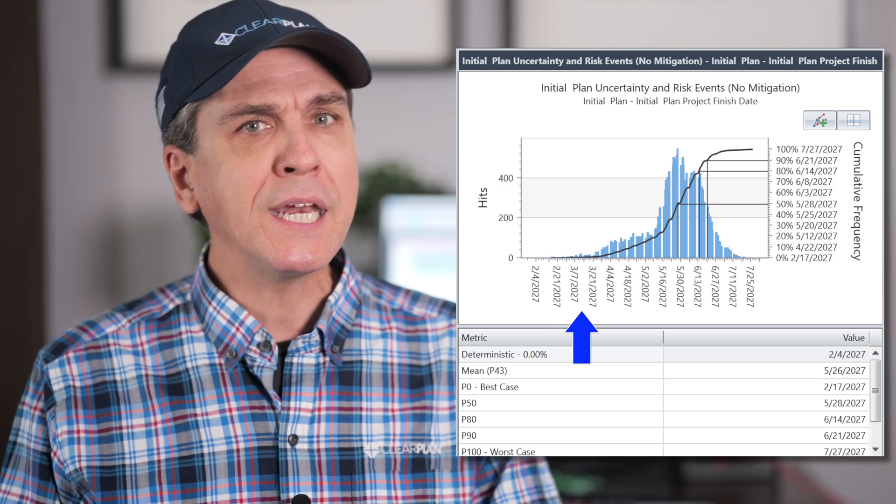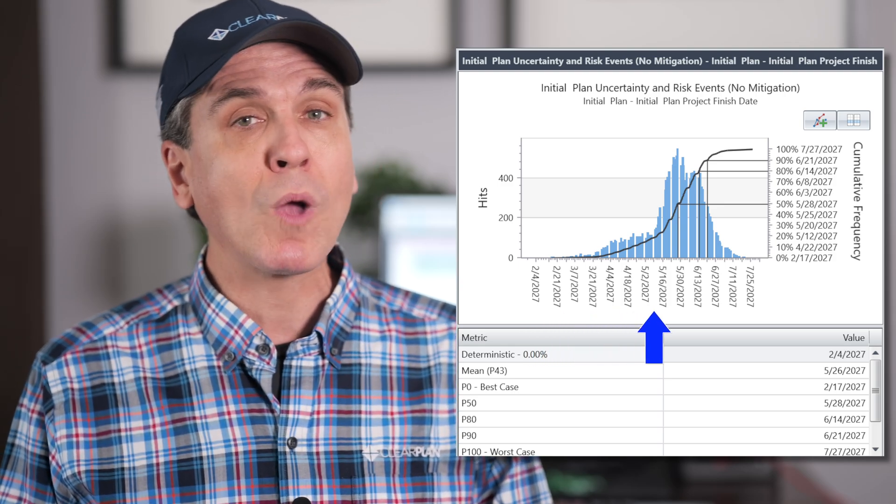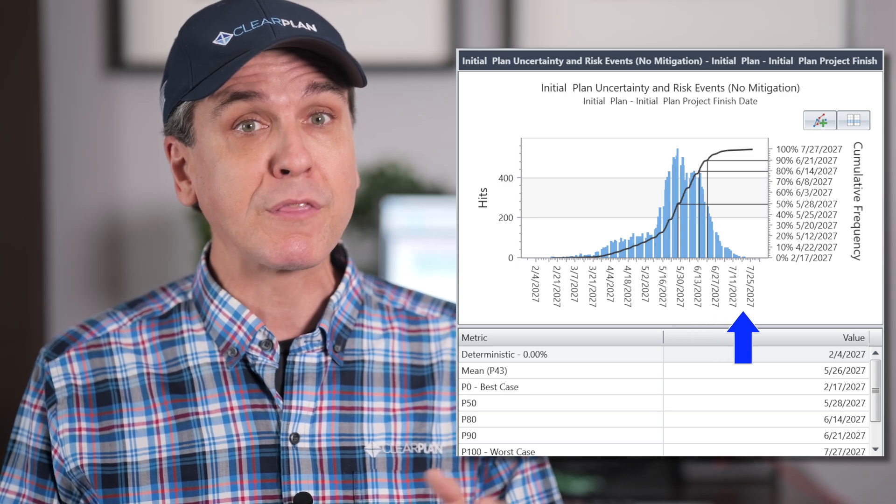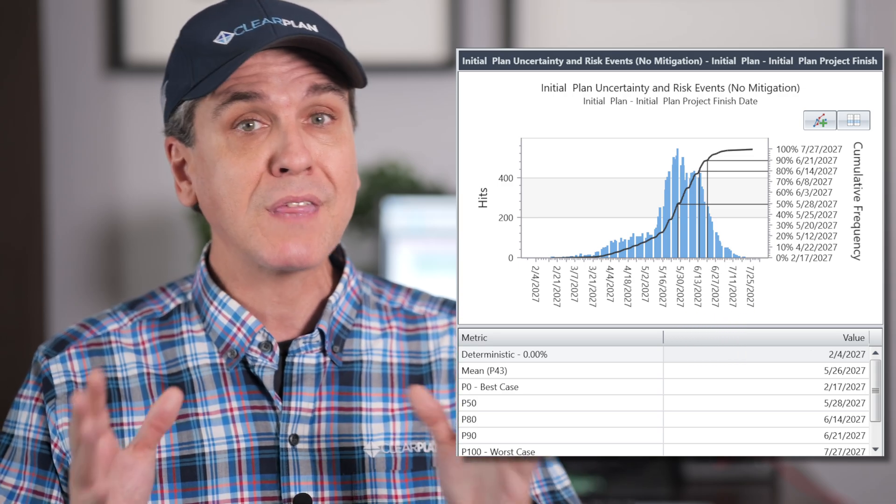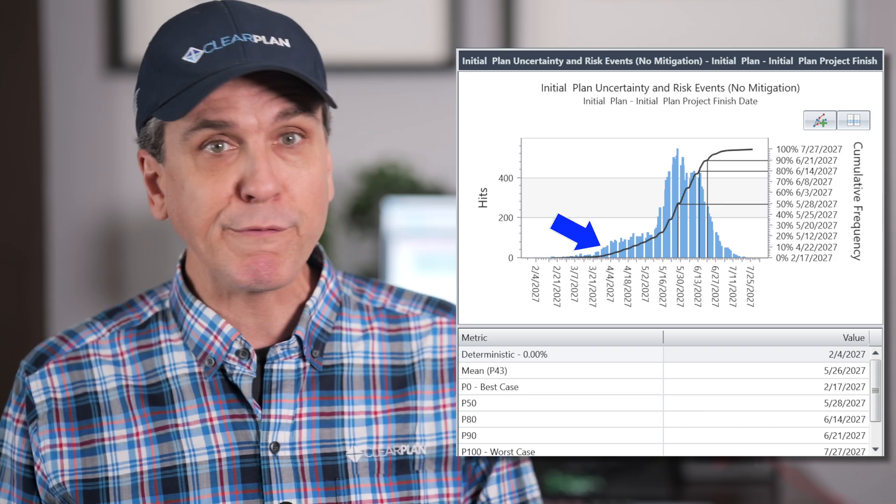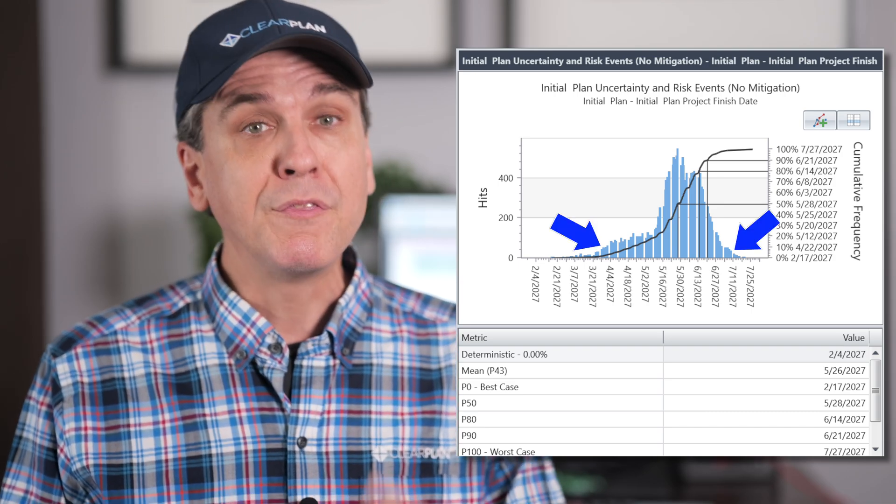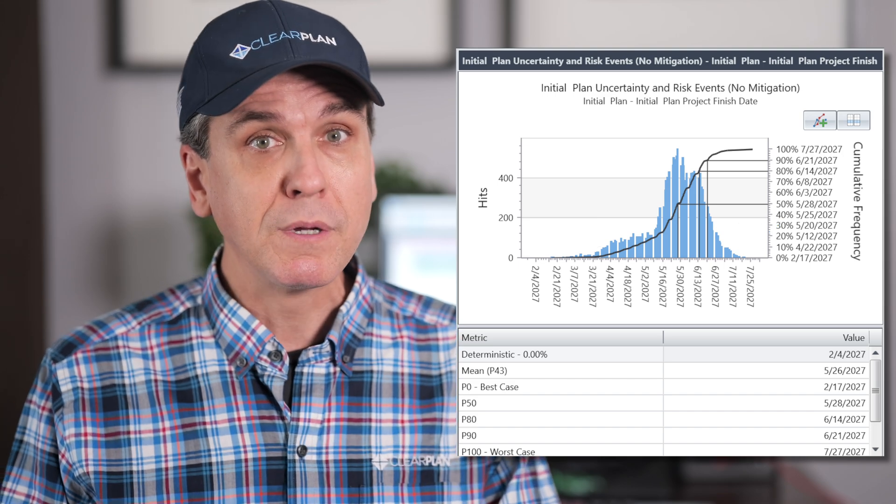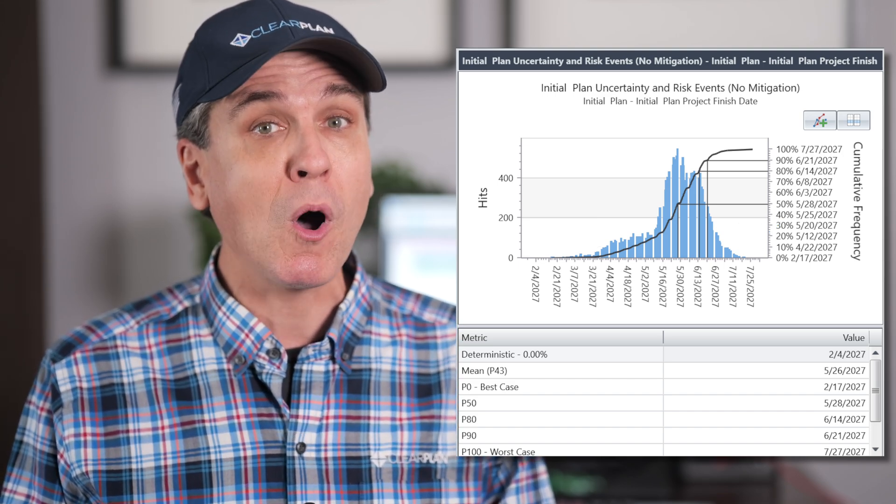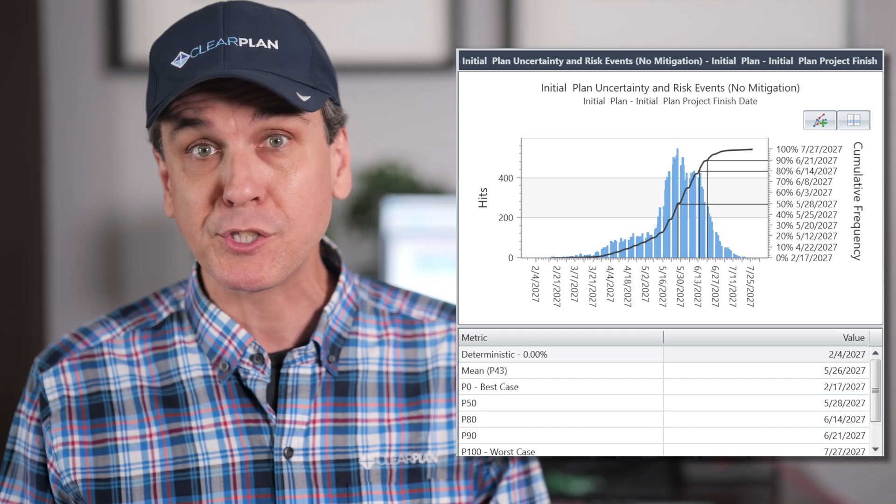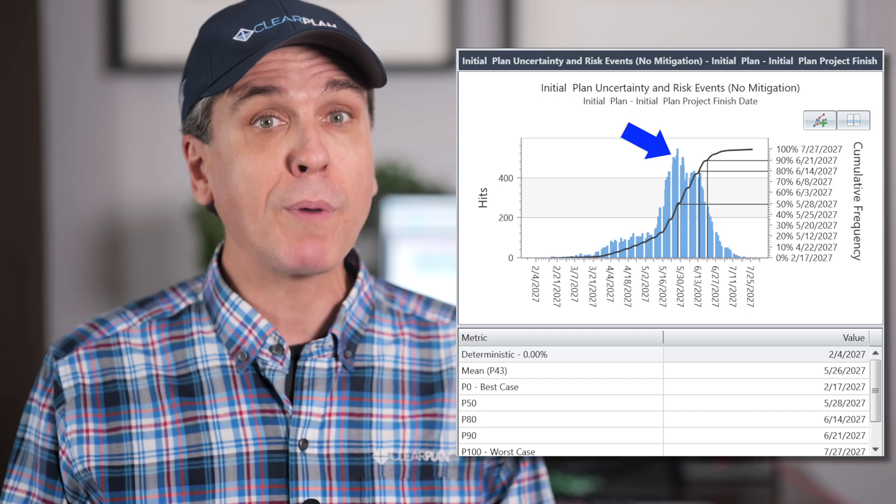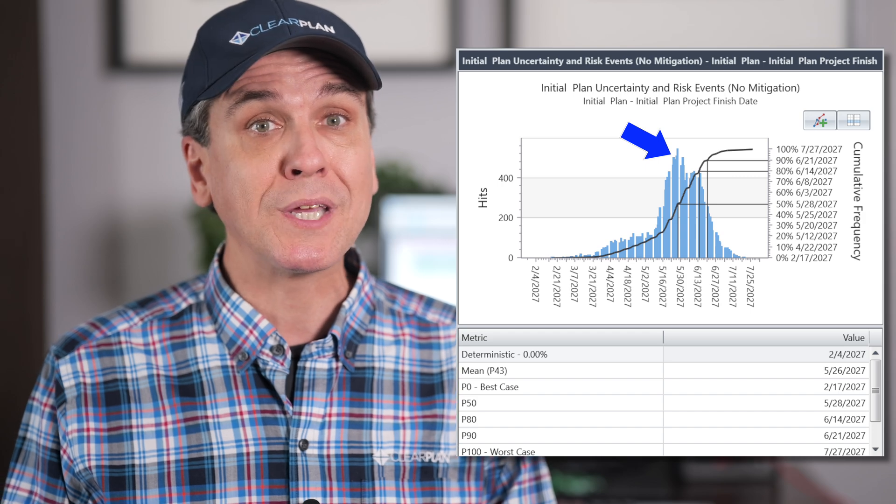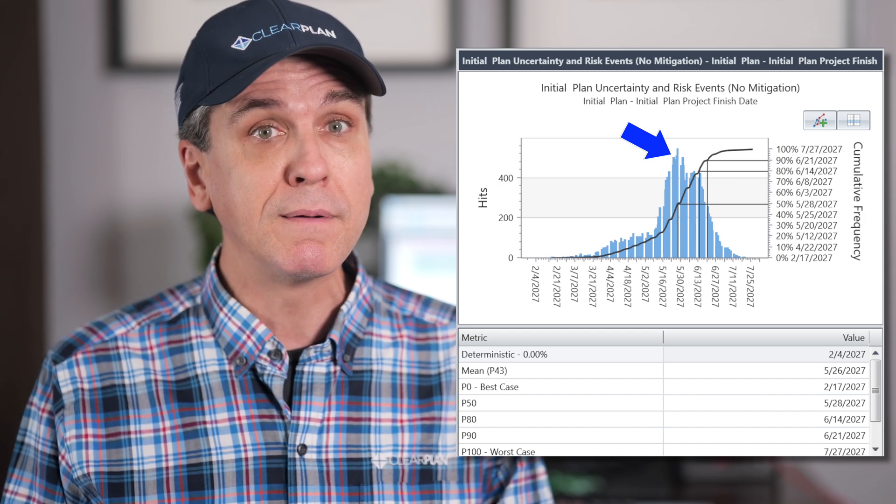Remember, by setting uncertainty and risks and then running the simulation, there are a number of different theoretical project outcomes, thousands. Sometimes it will finish earlier, sometimes later. This chart for schedules tells you when it may finish and how often it finished on each of those possible finish dates. The taller the bar on the histogram, the more simulations resulted in that specific finish date.